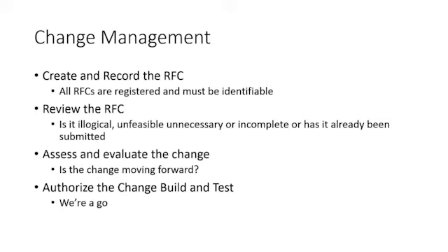Is it illogical, unfeasible, unnecessary, or incomplete? Or has it already been submitted? Yeah, you're working on a team and you see something and you have a great idea one night. You submit an RFC. Well, somebody else had that idea too. So maybe they submitted it before you, the day before. So we'll review the RFC and say, well, Mark already submitted that. We're good.